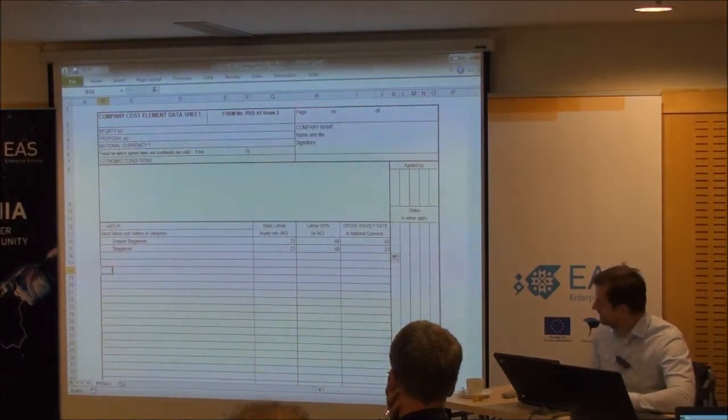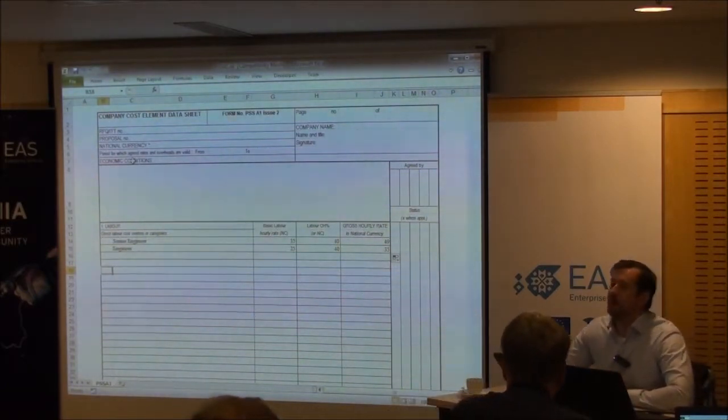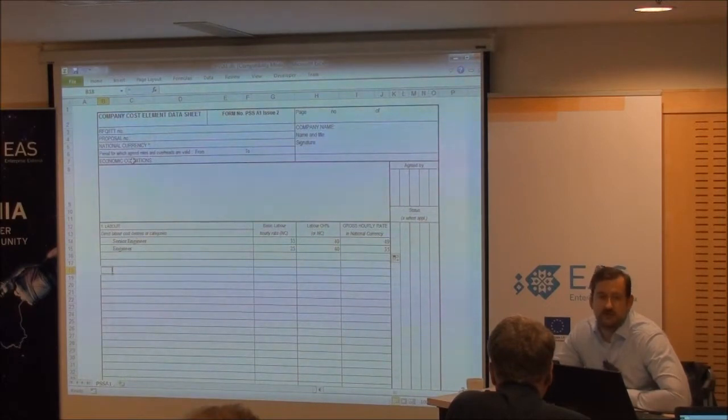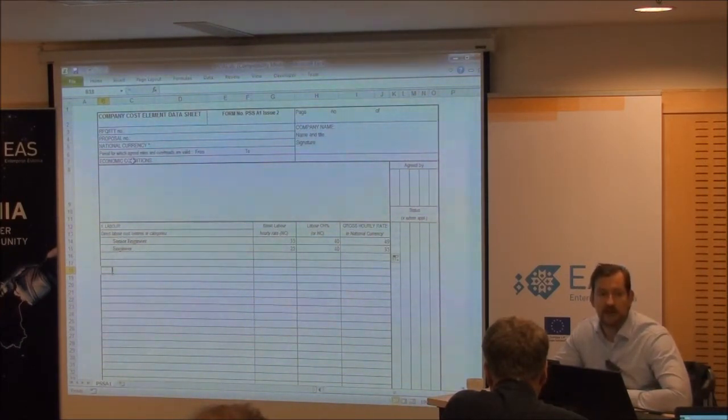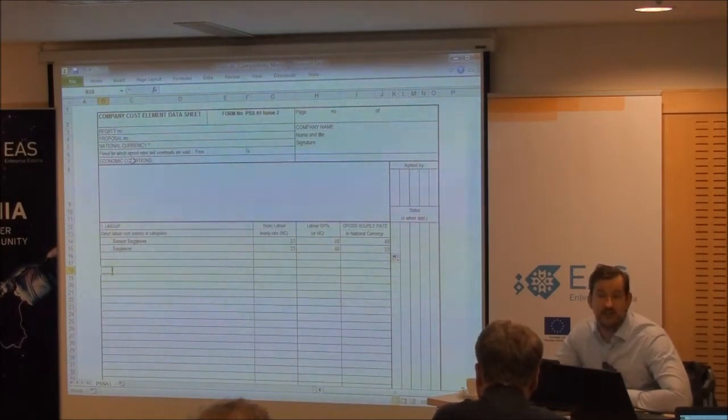What is meant by these economic conditions? Sometimes ESA will put a budget together based on a particular year. Like there might be economic conditions relating to 2008 or 2010 or 2011. Sometimes they do that particularly when member states sign up to a big program. If they start a very big program for hundreds of millions over a period of time, they might relate it back to the financial value at that economic point, because it's different a few years later, right?